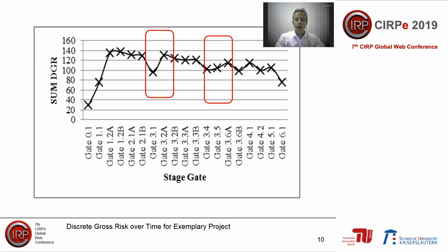Two examples are highlighted by the red frames. It is exactly this phenomenon which the previously introduced models for uncertainty funnels do not reflect, and which can result in the emptying of any budget reserves earlier in the project than planned. This points to a threat in applying the generic models. However, the good news is that estimators do appear to sense this, and this view is reflected in their understanding of the propagation of risk and uncertainty.